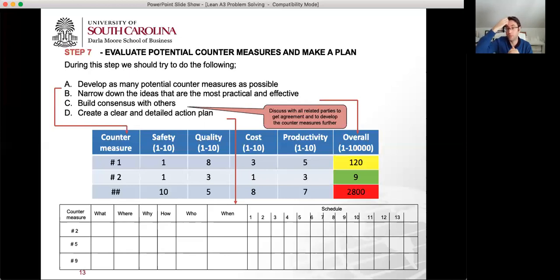And on the schedule, I always like to put beginning and end. So don't do any action plan in your life without beginning and end. Very important. If you only put the end, people will start doing it when it gets to the end sometimes, right? So you leave some wiggle room for that to happen. Mark where you start, because if you start late, you're going to be late, right? If you only take care of the end date, there's a high probability that when you get close to that, you realize that you need to begin, and then it's too late not to be late.